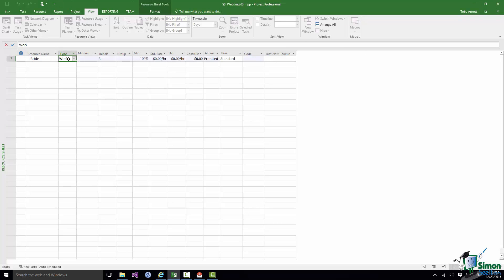There are basically three choices: work, material, and cost. And as we're going to see this is not always a particularly easy choice to make. Generally speaking people are entered onto the Resource Sheet as work resources because they do work, and whether or not they charge for that work is a separate matter.